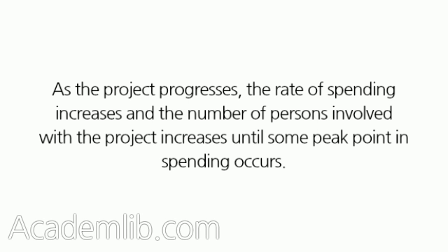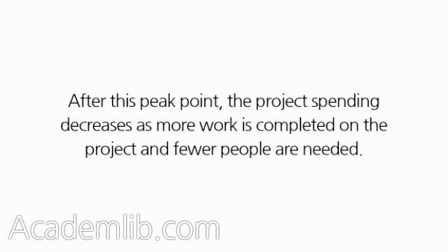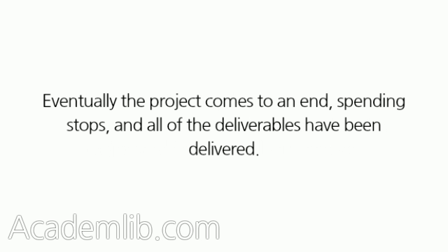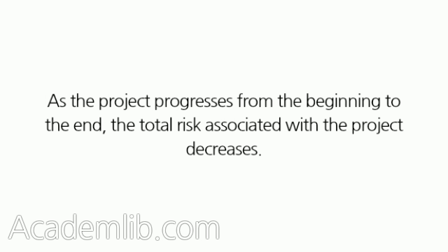As the project progresses, the rate of spending increases and the number of persons involved with the project increases until some peak point in spending occurs. After this peak point, the project spending decreases as more work is completed on the project and fewer people are needed. Eventually the project comes to an end, spending stops, and all of the deliverables have been delivered. As the project progresses from the beginning to the end, the total risk associated with the project decreases.